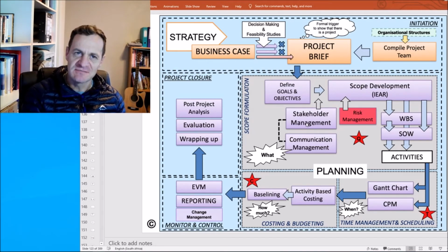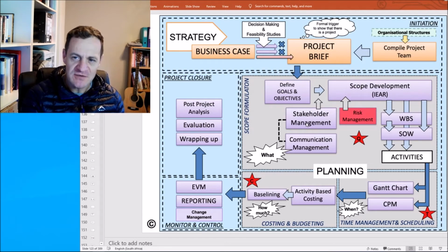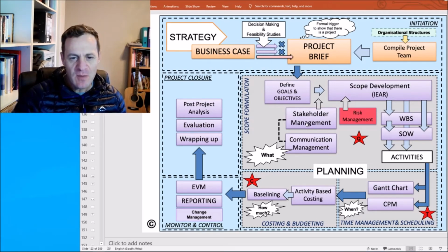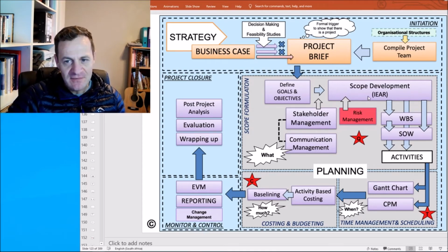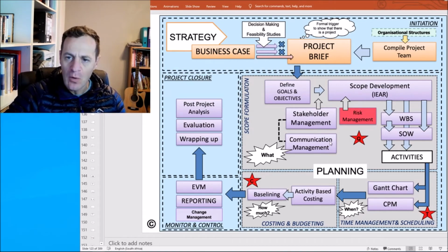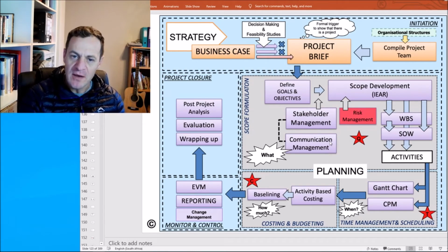And then what we say is, okay, we are busy dealing with the stakeholders, and most of the actions that relate to the stakeholder management process would be communication. So then I say, why don't we just pop in our communication there as well? Remember, we don't have final scope. We haven't dealt with the detail of the scope yet. But it's a good place to just fix maybe our communication lines, the way we're going to communicate, and when. I would say a good communication plan is when, who says what, when, in what format or technology or whatever. So you can fix that, you get that in place.